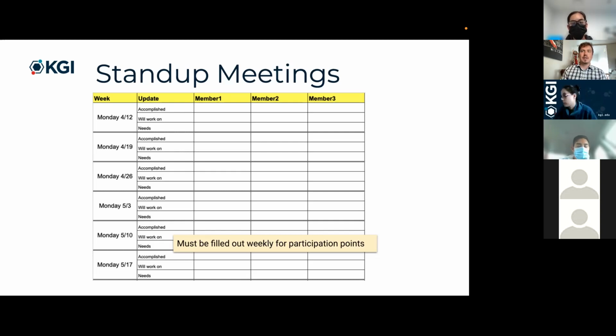But it's really more of a concept that a company will use that is working on multiple sprints. Because let's say that your velocity is 10 units of difficulty per sprint, right? And each sprint is 2 weeks. So 10 units of difficulty per 2 weeks. What does that mean? I have no idea, right? It's more useful within the context of multiple sprints in a company, because I can say, okay, that was a slower sprint, that was a faster sprint, and what might be the reasons why. So you don't have to worry about that for your specific projects, but it's a very interesting concept, right?